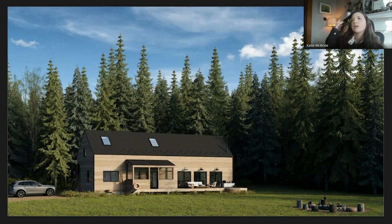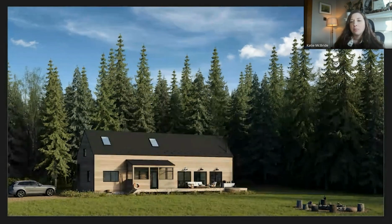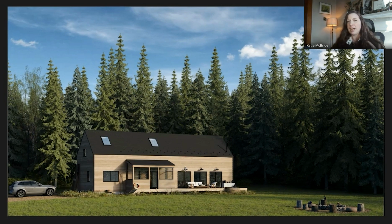And then on the interior, it was just a lot of really mindful finishes and fixture things. And then also collaborating with the builder on the millwork, trying to hit a certain cap on the millwork and then having him design to that. That was really helpful. Things like we now know if we want to stay on a certain budget for tile install, it should be your standard kind of subway tile. And if we need to save even more, it should only be where it needs to be, which is in the shower and tub, not doing it for the look, but really trying to just put the materials where they need to be and finding simple, elegant details to make them all work together well.